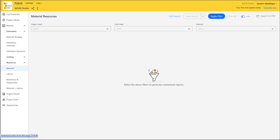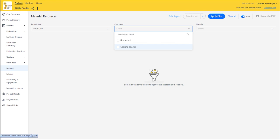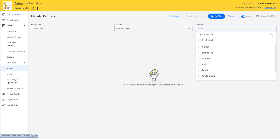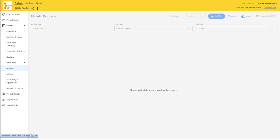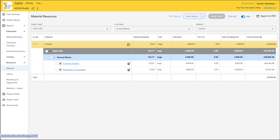Under material resources, if we come back to this project, there's the project title. The item of work we'll be checking is our substructure groundworks. I want to see the actual materials for each item of work. I've come down to cement right here — click on the cement, then click on apply filter. It shows you the total number of cement bags we'll be using for this project — not just the total numbers, but also the price and total cost of this particular material.